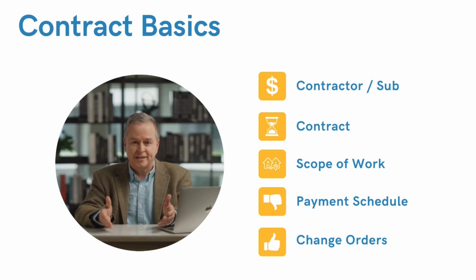You also want to understand liens and lien releases. Remember, contractors have had rough experiences as well, with people that don't pay or don't pay the whole bill. One of the reasons liens and lien releases exist is to keep that from happening. So you want to know what the mechanism is to have the lien released, so that when the job is done, you have a document that says everything's accepted and done and paid for. You want to make sure that your contractors are working with permits. That way you know that the rehab is being done to code. You never want to have to tear down sheetrock to have a city inspector actually look at the plumbing or the electrical.